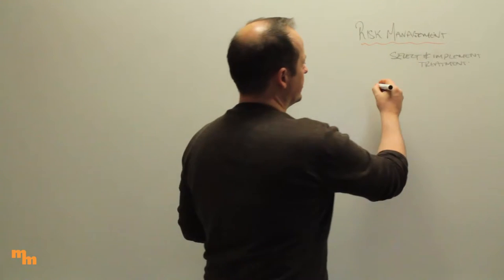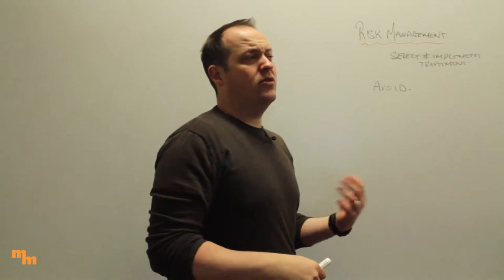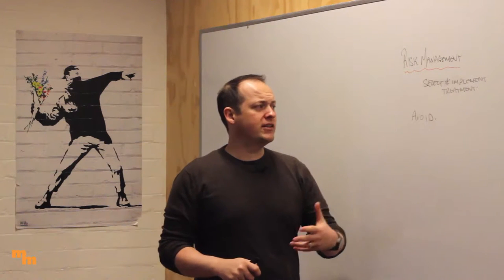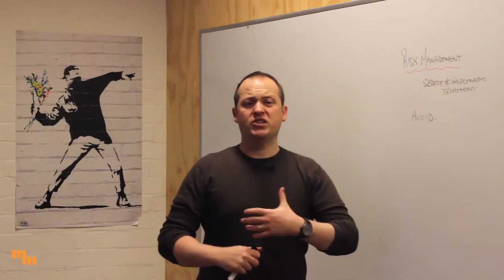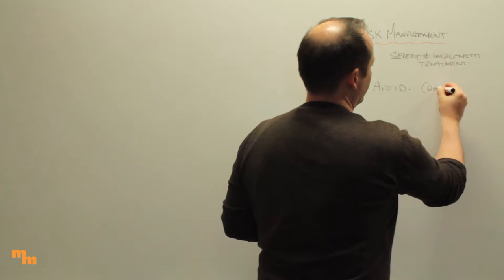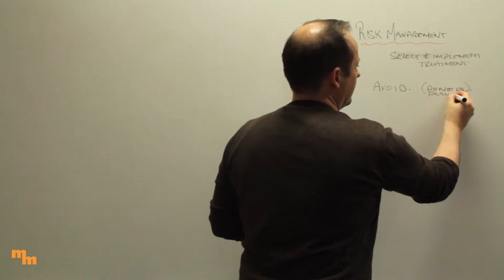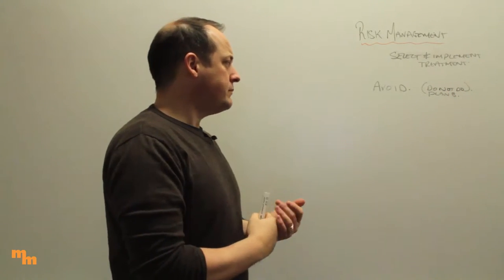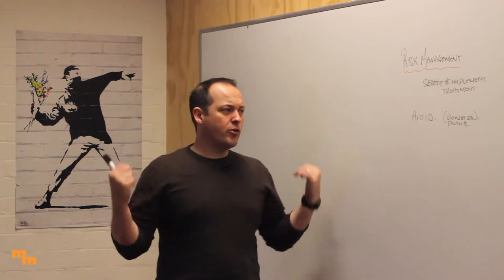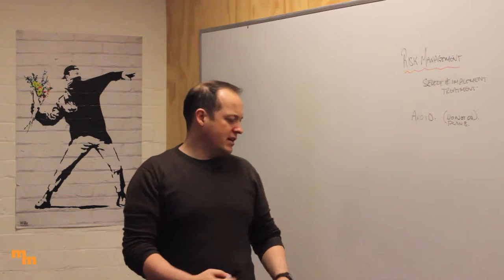The first strategy is avoidance — can we avoid the risk? We make a decision not to become involved in the situation that can bring risk onto us; we just don't do that activity. If we're planning to do something and we think it's too risky, can we just not do it? Is there a Plan B? Can we do something else instead of undertaking that activity? To avoid means do not do that — anything apart from actually undertaking the risk.